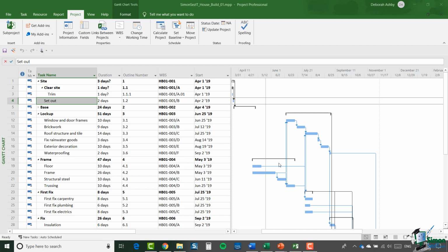There is a fundamental difference between a situation where you are given codes to use and they need to be assigned to the tasks in a project in such a way that those codes never change, and the procedure whereby the tasks in a project are outline numbered in some way and that the numbering is updated as you update the structure and contents of the project. So at different times you may want either of those behaviors. Do you want your codes to be absolutely fixed once they're applied, or do you want your codes to be flexible and adaptable as the content and structure of a project changes?